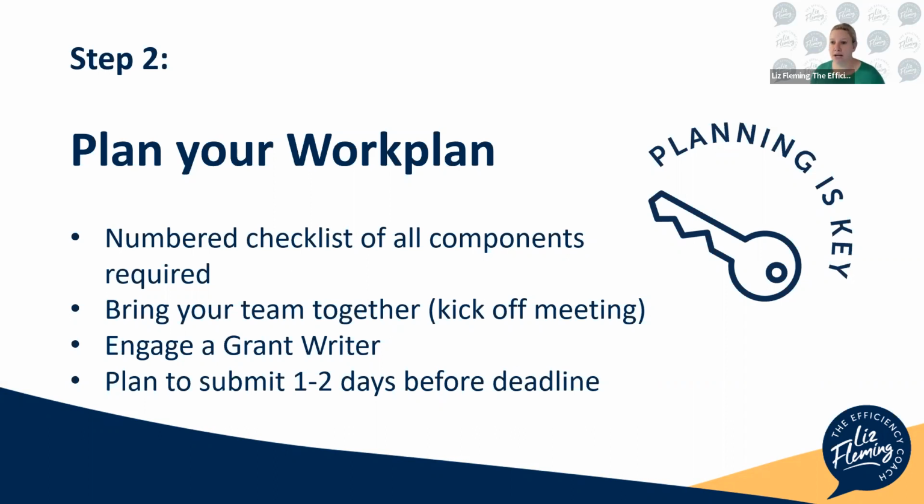So when you're working out your work plan, and I always do this with my clients, we plan for a couple of days buffer. If we can help it, we don't want to submit on the last day, because that's when the big rush is. We want to get in before that, because some assessors go through submissions in the order they come in. So we want to be in the running, and not be the last one submitting it two minutes to the deadline.